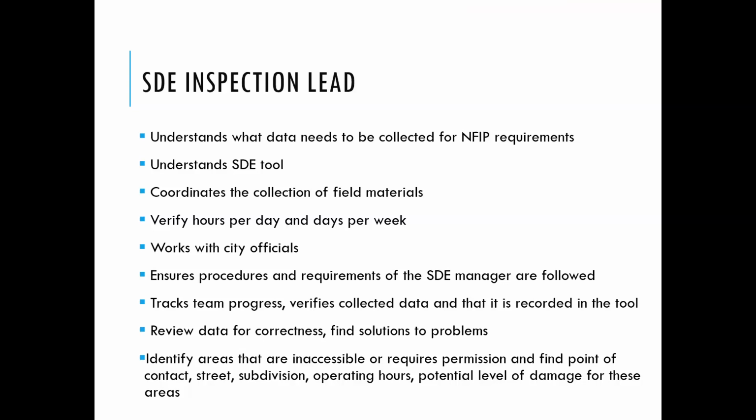So you have your quality assurance person or the SDE inspection lead is reviewing the data for correctness and making sure that the teams are producing consistent assessments. And then identifying what areas might be inaccessible because it's too dangerous or it's unstable, or getting permission to enter private property.